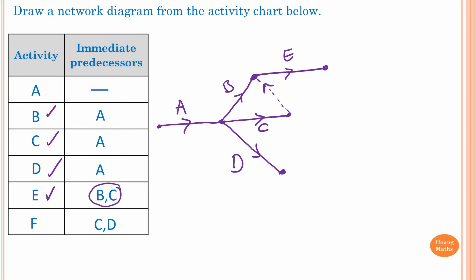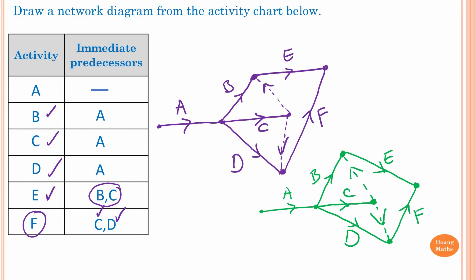For Activity F, we need to complete Activity C and D. You can connect from Activity D across to Activity F, and use a Dummy Activity to connect between C and D as well. So we connect like this — there you go. This is the network diagram for this activity chart. You can redraw the network diagram to make it look a bit better.